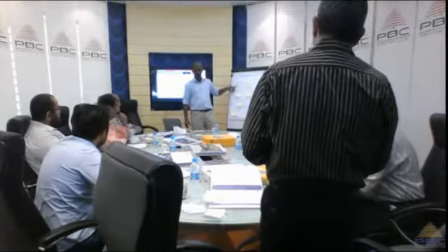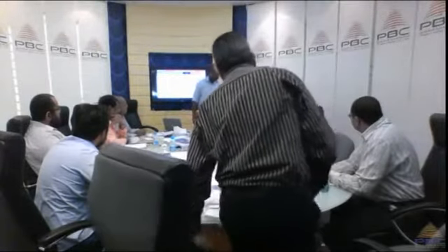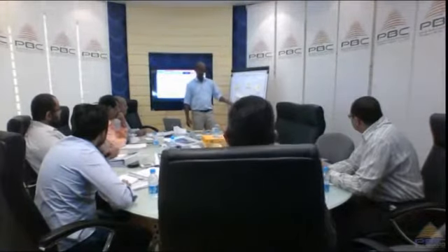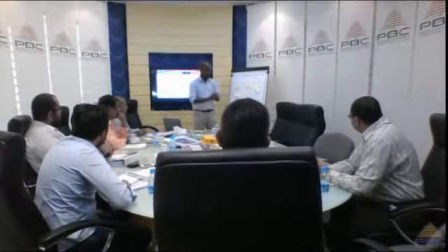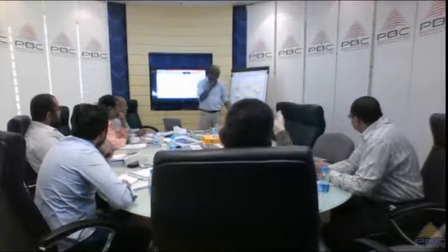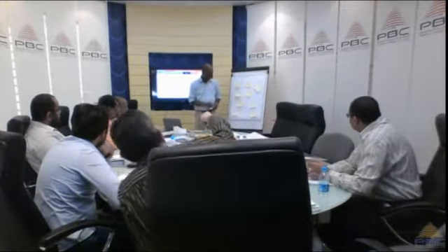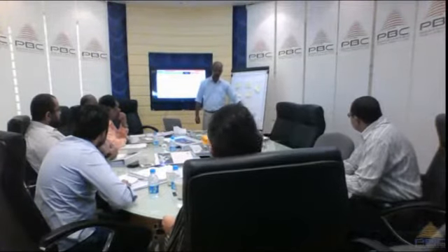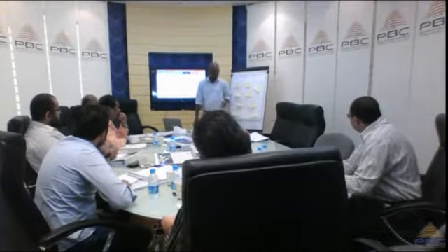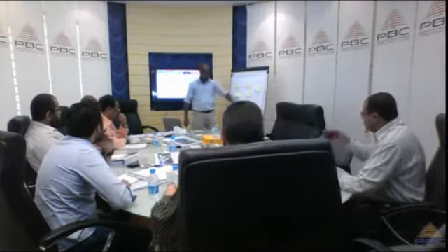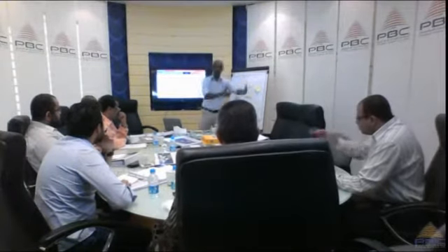Can you recall any of these things? Risk threshold, risk tolerance, positive risk strategies, negative risk strategies, cost reimbursable types of contract, fixed price types of contracts, specification types, and the PI matrix and EMV. Fixed type is lump sum contract. Cost reimbursement is cost reimbursable: cost plus fixed fees, and cost plus incentive fees, CPIF, and cost plus award fees. These are the 3 types.